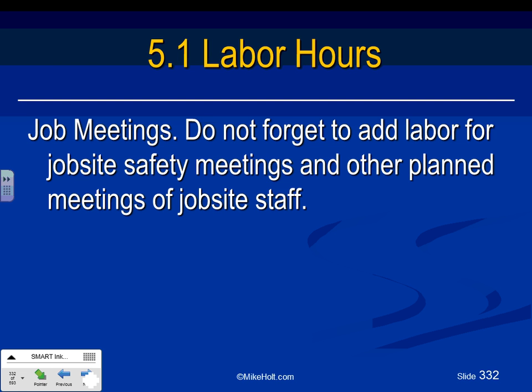Job meetings. Every week, there's weekly meetings, guys, safety meetings and coordination meetings for every job, a weekly meeting for the disciplines. You have to accommodate who's going to be doing the weekly meeting and allocate some dollar values for the staff who are doing the meeting.